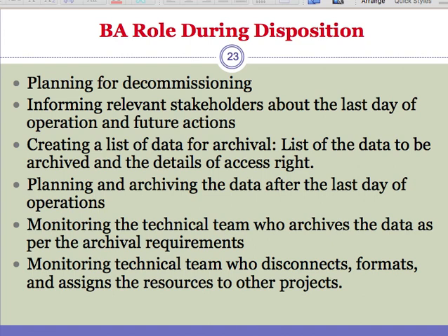The BA has a role during the disposition. It is planning for the decommissioning. You may call it decommissioning or disposition: informing the relevant stakeholders about the last day of operation and the future actions, creating the list of data to be archived and the details of the access rights, planning and archiving the data after the last day of operations, monitoring the technical team who archive the data as per the archival requirement, and monitoring the technical team who disconnect and format and assign the resources to other projects. That is how you complete the work. And of course, document all the activities and hand this over to your stakeholders.